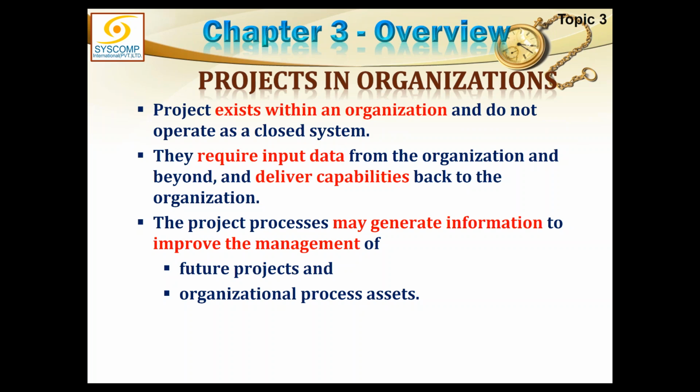So we take a lot of input from the organization, and once we deliver our product, we give it back to the organization. The project processes may generate information to improve the management of future projects and organizational process assets. So once this project of ours finishes, it will leave some lessons learned for the future projects. They will be populated into the organizational process assets. The library will then contain our data as well, and that will be used by future projects.